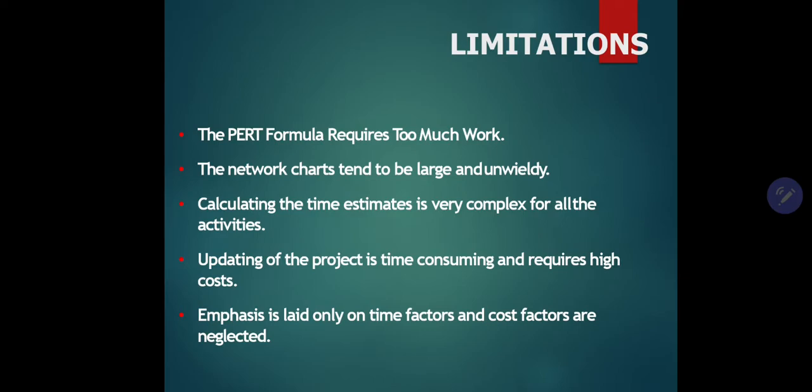There are some limitations also. PERT formula requires too much work because there are three time estimates. The network chart tends to be very large and unwieldy. Calculating the time estimate is very complex for all activities. Updating the project time is consuming and requires high cost. Emphasis is laid on time factors and cost factors are neglected. So these are the limitations of PERT.